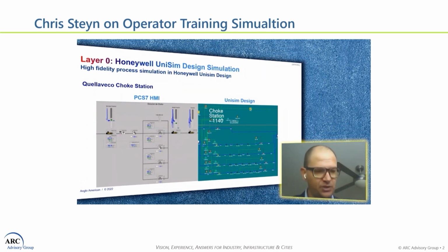We had the experts in, we had everyone. Ultimately, it was found that the design was flawed, and it caused us to change the design. The OEM came back to us after several heated discussions and admitted that the design was flawed. But it was a great success story for the Unisim design platform that pointed out before the plant was built that there's a fault in the design, which would have caused us quite a lot of downtime during commissioning.